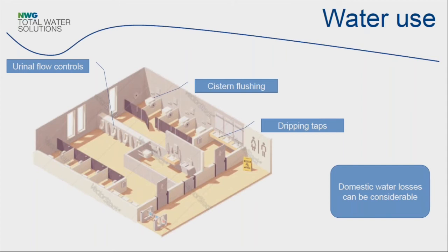That was using more water than they thought it was going to use, obviously, but it was also putting more wear and tear on the flush mechanisms, which eventually broke. So every time one broke, it was actually cheaper to put in a higher flush system than replace these proprietary flush mechanisms. So again, that was a failure in the optioneering process to really understand the impact of this.